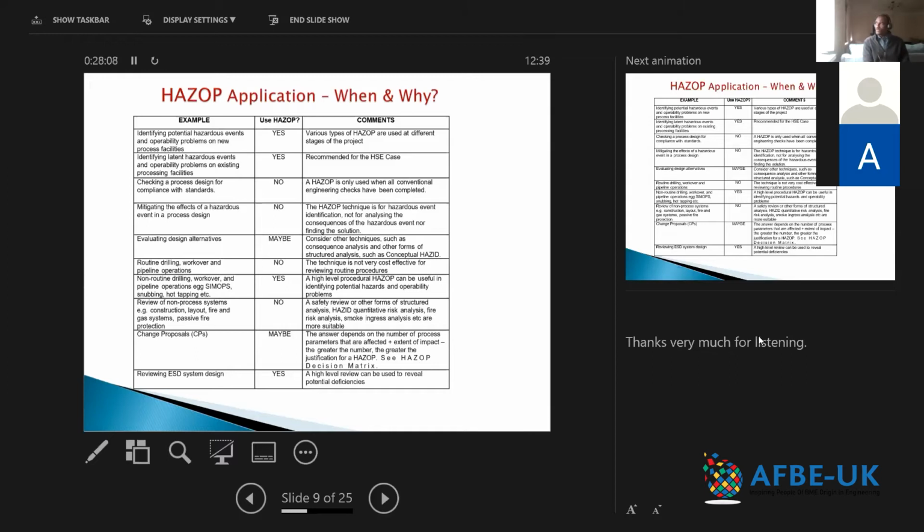So you have a project that's at concepts, at study stage, concept selection phase, and you're wondering, should we use, say, for example, two 100% heat exchangers or 4 50% heat exchangers, just as an example. So with a HAZOP, you decide to do a HAZOP on both of them to determine which of them has more risks or more hazards associated with it based on your plant's configuration.